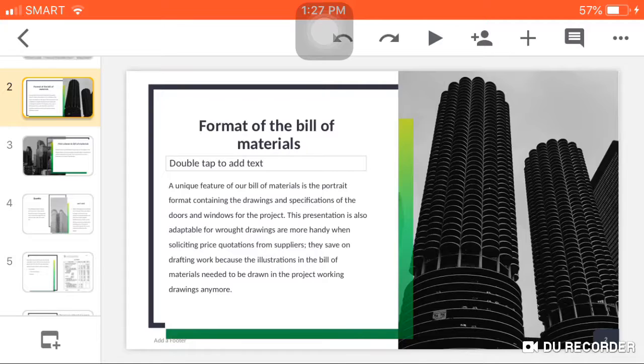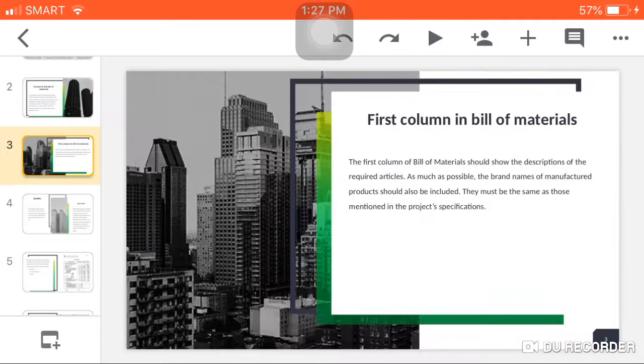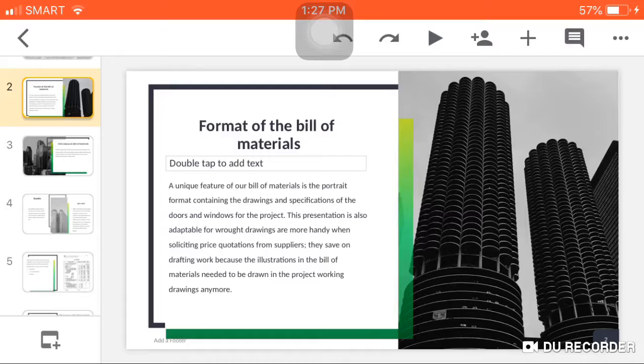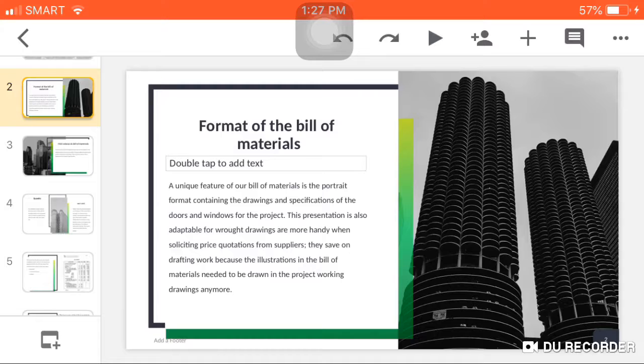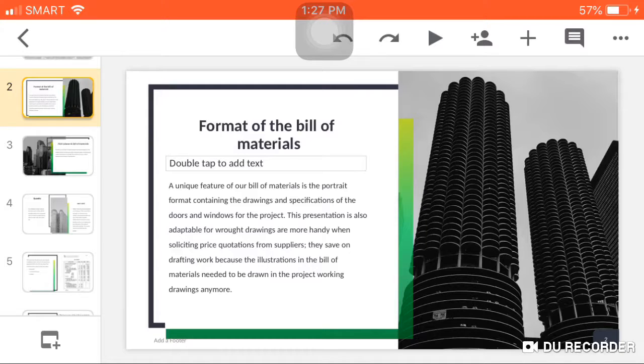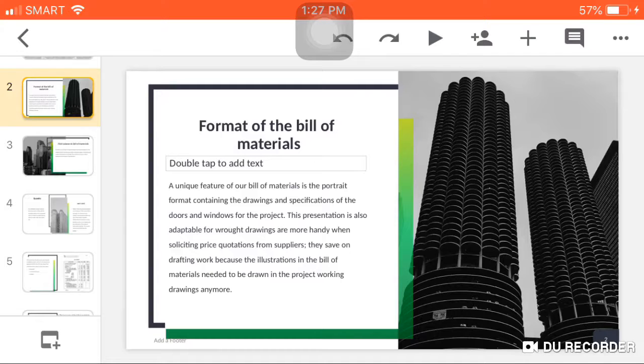A unique feature of our bill of materials is the portrait format containing the drawings and specifications of the doors and windows for the project. This presentation is also adaptable for raw drawings that are more handy when soliciting price quotations from suppliers. They save on drafting work because the illustrations in the bill of materials don't need to be drawn in the project working drawings anymore.